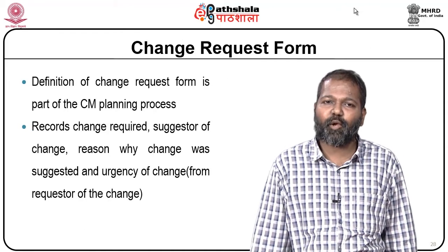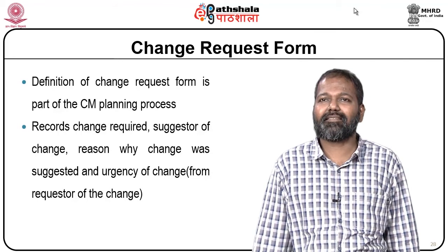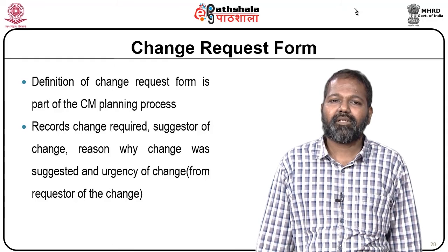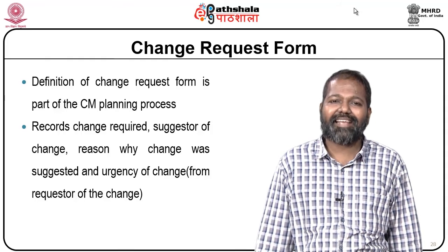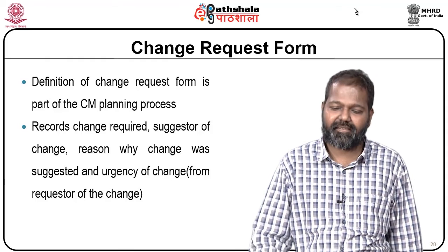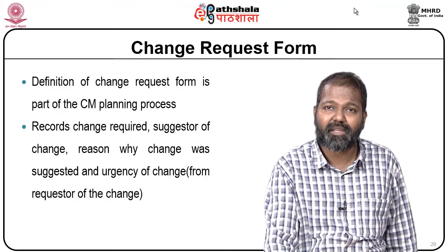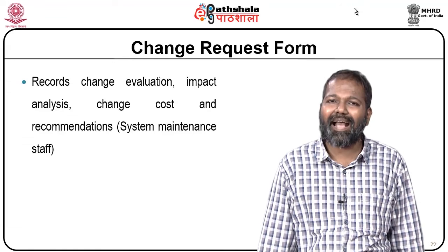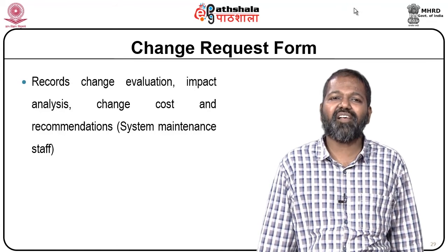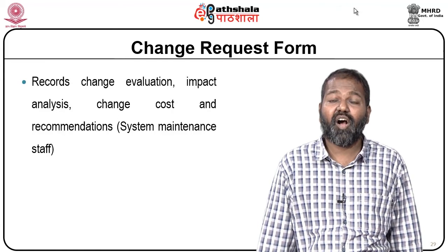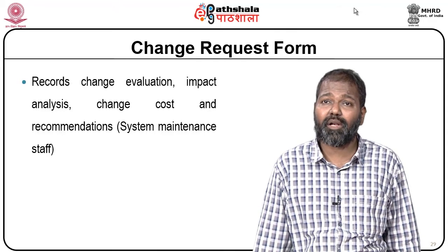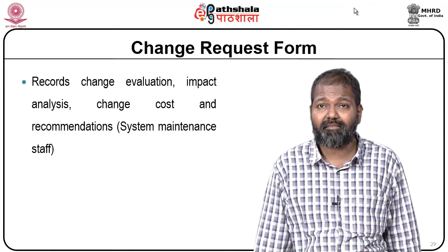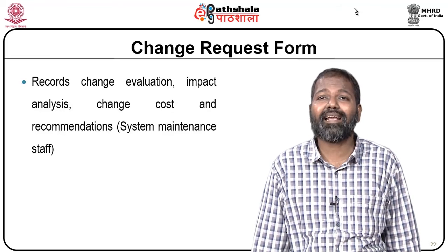We have a change request form in which the changes required are recorded, why the change is required, and the urgency of change is also mentioned. It also records change evaluation, impact analysis, change cost, and recommendation. Cost is one factor that plays a major role here. When there is a change when you are in the testing phase, the cost involved will be high.